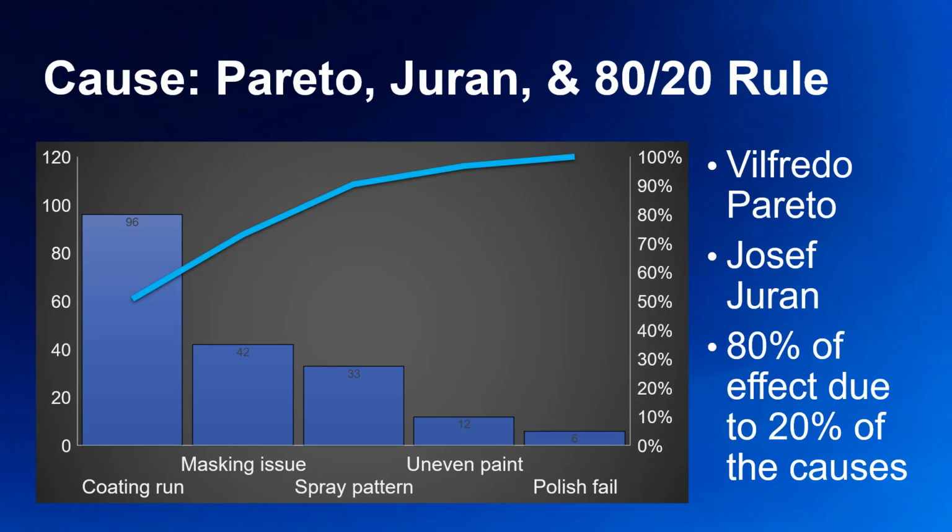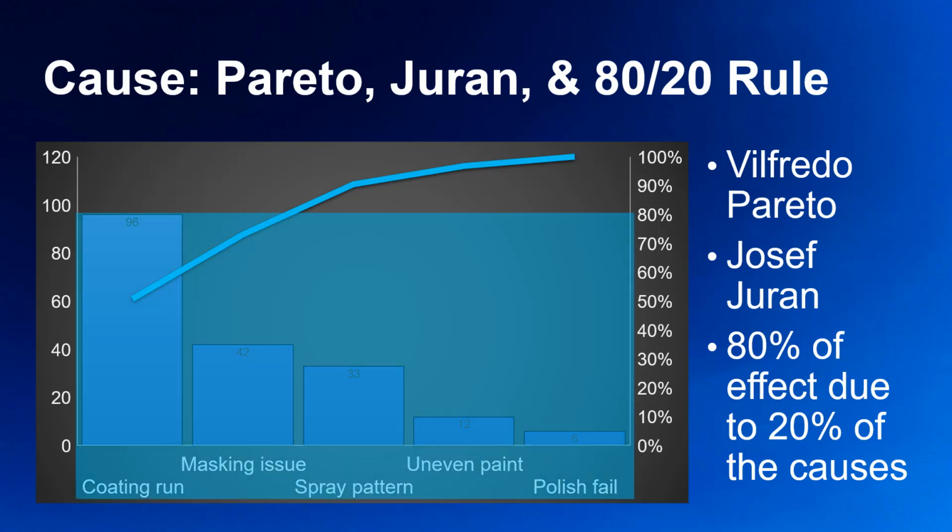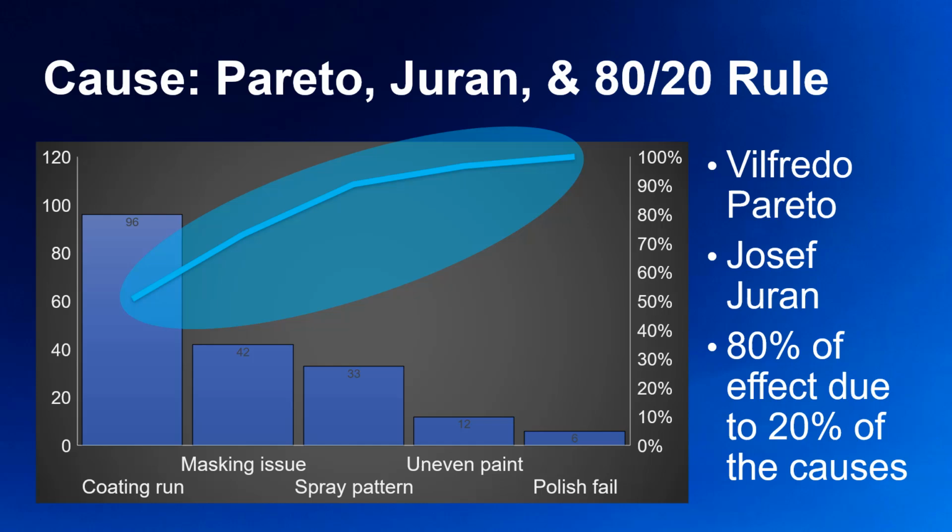This example of a Pareto chart is sorted by the highest incident first, based on a check sheet that tallies 5 main causes for defective paint jobs. The line across the top tracks the aggregated percentage for all the causes, shown up to 100%.